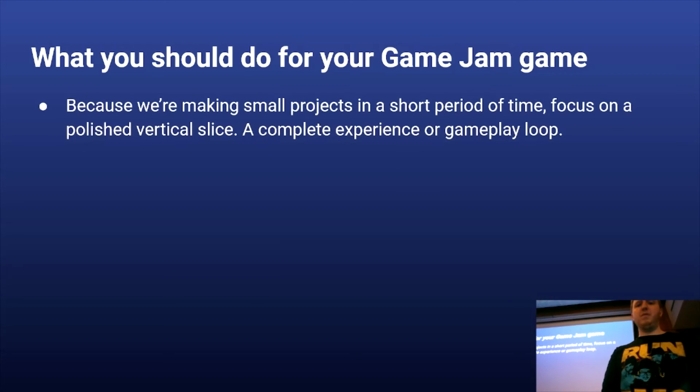Because we're making small projects in a short period of time, focus on a polished vertical slice. You might have a game idea that could take a lot of fleshing out, right? Maybe you have this crazy dungeon crawler with all these cool mechanics. Don't try to make the very introductory part of the game. Don't do the first tutorial levels, and don't do the crazy last part of the game either. Try to take a vertical slice somewhere in the middle of whatever kind of game you're making that showcases all the core mechanics and the complete experience of the gameplay loop.